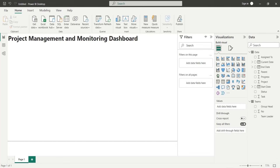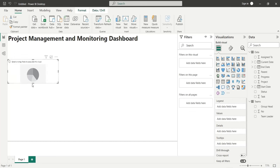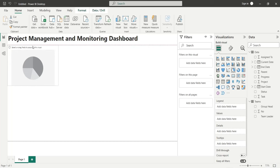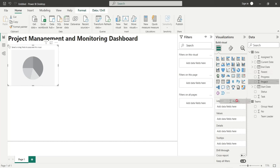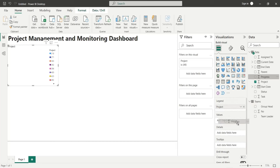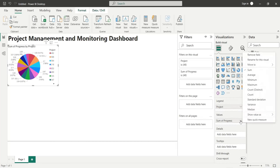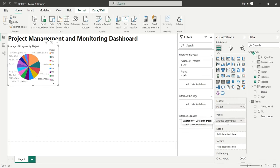Add a pie chart to the dashboard to display progress by project. Add the project field to the legend area. Add the progress field to the values area and change it from sum to average.